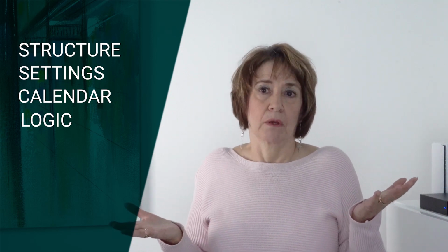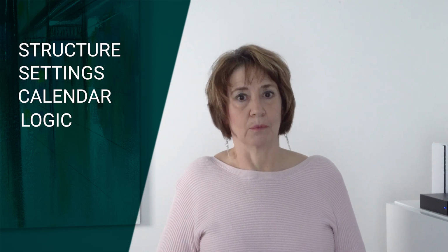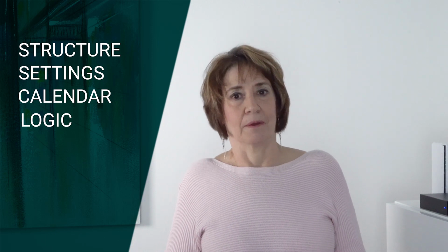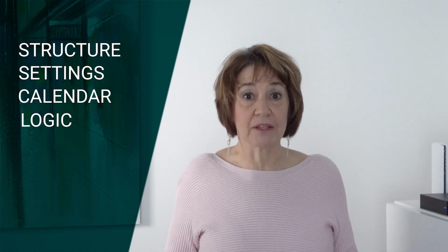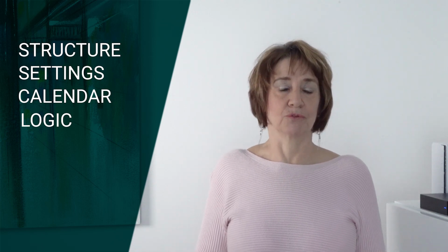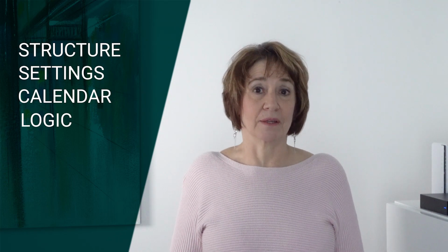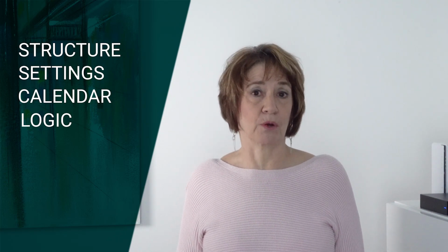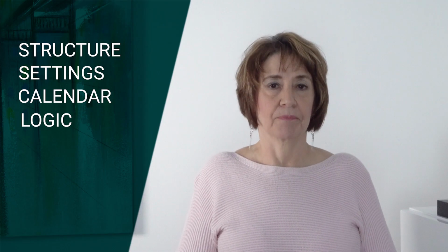For the project start or whatever kicks off your project won't have a predecessor. The handover, project handover or product handover, whatever is at the end of your project, won't have a successor, but everything else really should have a successor and a predecessor. And I always say that they should definitely have successors, because if they don't lead into anything within your project, then why are you doing it? So just try and ensure that everything is all linked.